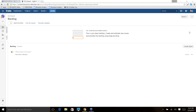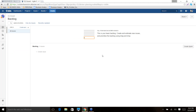Now your project is ready. What is the next step? We create a product backlog. You are already in the backlog view by default. Within the product backlog, we start with epics and then go to user stories — that's the correct order.